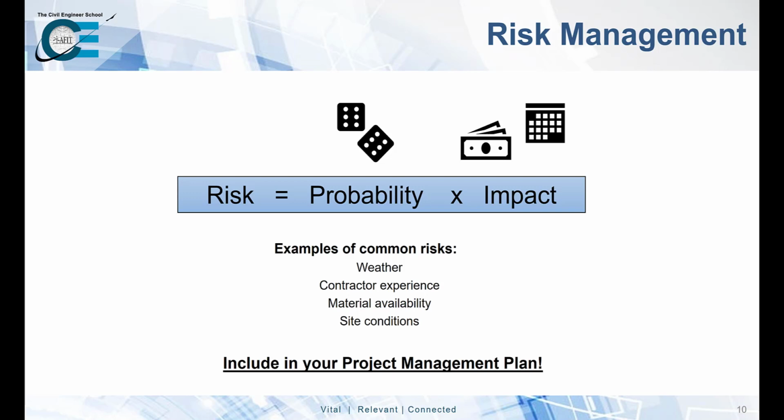Risk impacts in construction are largely measured in time or monetary cost, but could also include quality, resource, or scope impacts. By looking at the likelihood of a risk occurring and its impact, we can begin to prioritize and determine which risks to care about most.